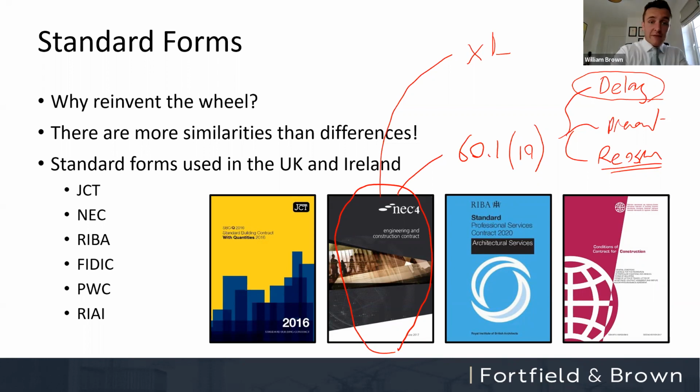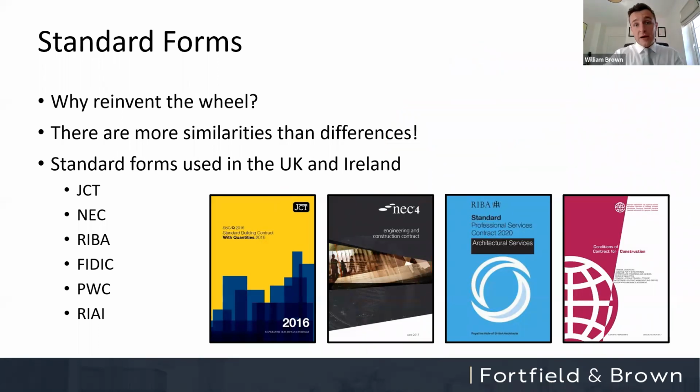And it's even more difficult under the JCT. At best, you could argue that it's force majeure, but same thing as COVID, that would only entitle you to an extension of time, no recourse to additional money. The Ukraine situation would only apply to materials like steel sourced from Ukraine, absolutely. So again, it's even more difficult to prove that. So the war in Ukraine, unfortunately, is probably a contractor risk. And that links into a more general point and a more general principle as well in terms of risk.